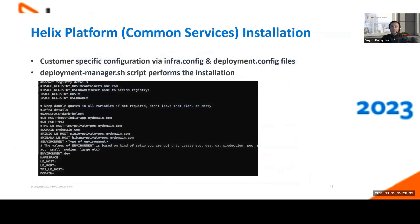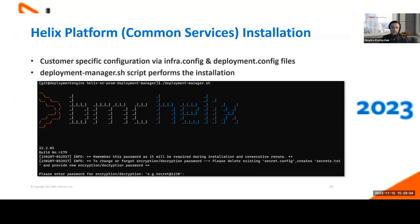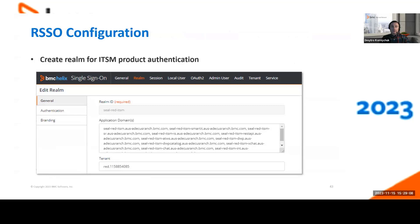For the platform installation process, we have the Deployment Manager shell script which performs the installation after you run the health check tool. Once you execute it with all predefined setup, you should be good to proceed with the platform common services installation. Once common services have been deployed, you should set up the RSSO Realms with the required tenants. Once SSO is configured, you start the Innovation Suite ITSM pipelines installation.